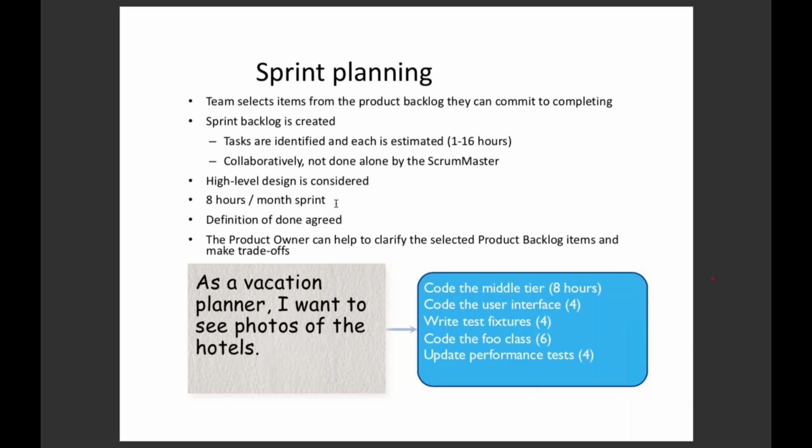I told you, in Agile, everything is time-bound. You cannot take days and days together for this planning. If it is a one-month, four-week sprint, it is 8 hours. If it is a two-week sprint, it is 4 hours, on a pro rata basis.